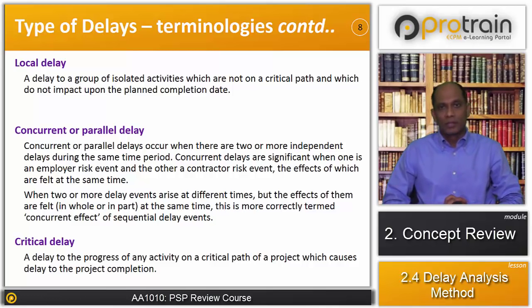However, the employer fails to provide the design information to the contractor in the third month, but he provides the design information in the fourth month of the project. So the employer has delayed providing the design information by 1 month. However, the contractor places the purchase order in the third month and the project progresses.